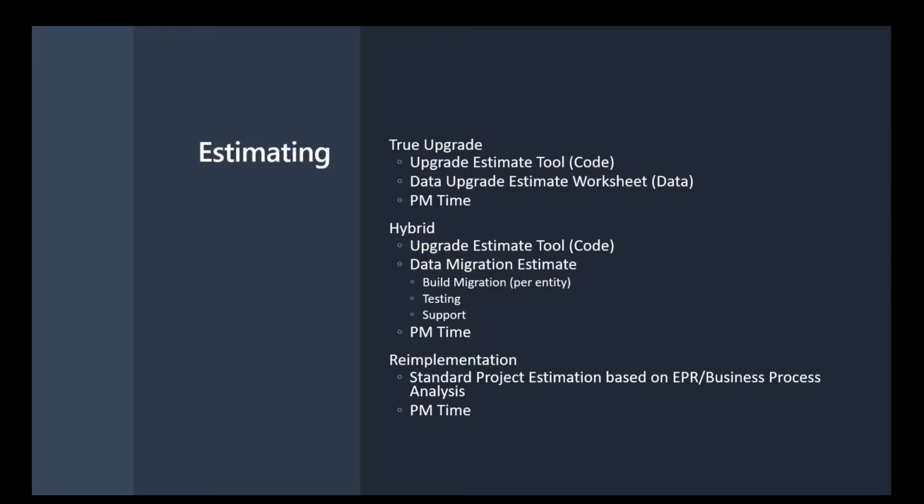So we're going to recommend another life cycle here for the estimate. We'll be able to give a high level estimate initially, but we want to refine that more because we're going to treat it more like a new implementation process, with the advantage that we have experience in AX for all the data conversion. So we've got a lot of efficiency gains there, and we also have a lot of efficiencies from an end user training perspective as part of that process. So that's how we go through our estimation effort.